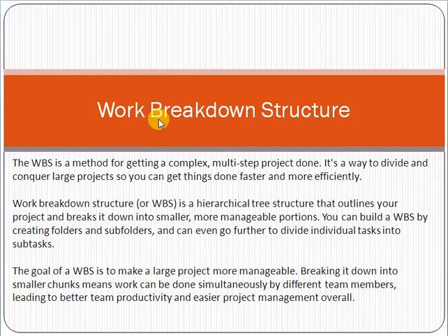Friends, for example, you have to manage a software project. For example, you have to make an e-commerce solution. So what can you do? You can divide the work into sub level work, subdivision work. What does that mean? If you want to build an e-commerce solution, first of all, you have to plan, you have to develop, you have to test, and you have to deploy to production. So it is a very simple way.